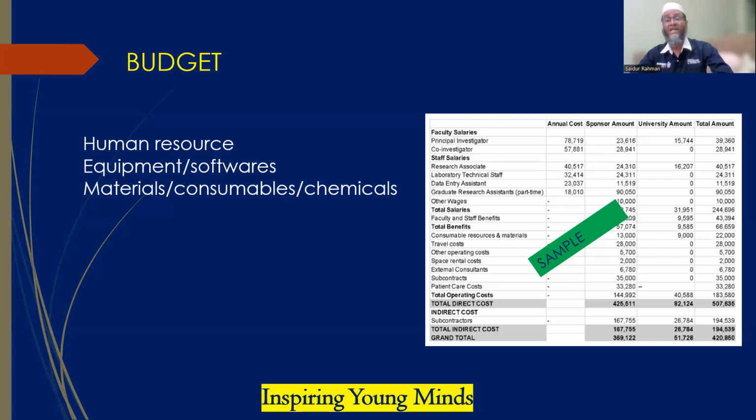Again, here you have to see how much the funding ceiling is. If it is 2 million and the equipment is 10 million, you should not bring that equipment here. There will be other ways, such as service or rental. So you need to know the amount, and based on that, you plan. If it is a 2 million funding for a project, maybe you can calculate 40%, and then maybe 200,000, 300,000, 500,000. You can allocate accordingly for equipment and software.